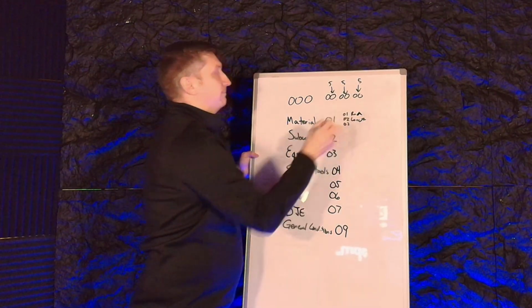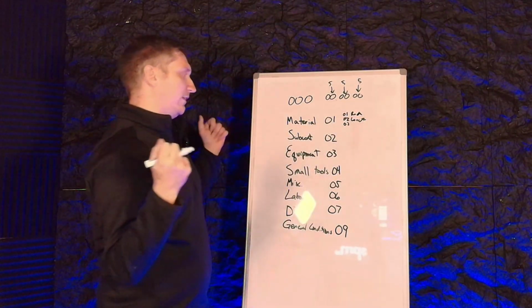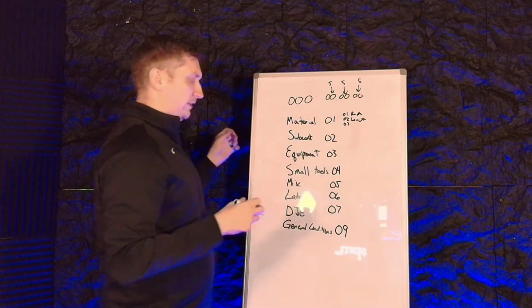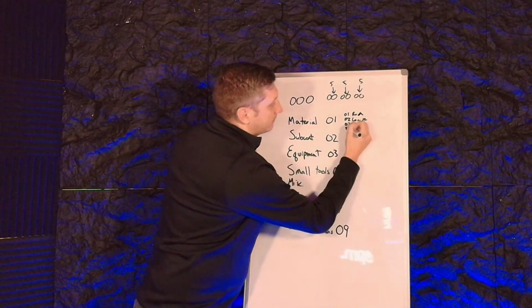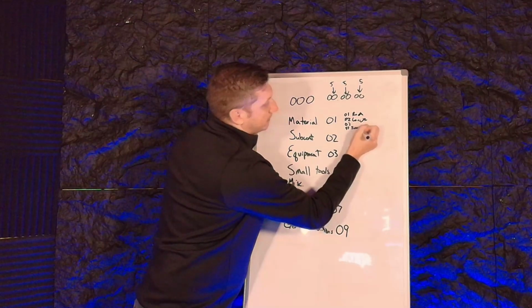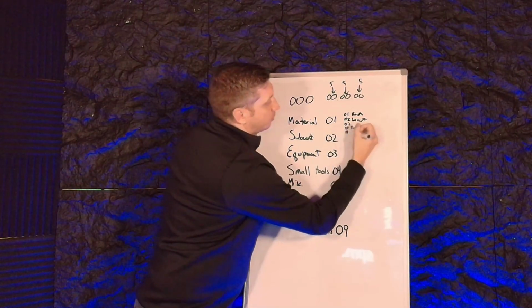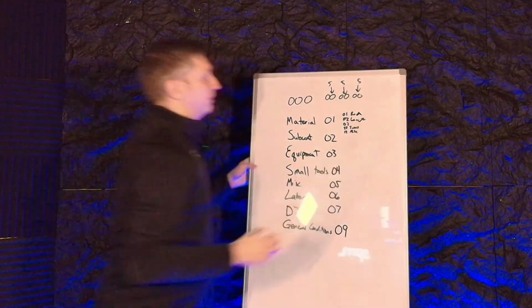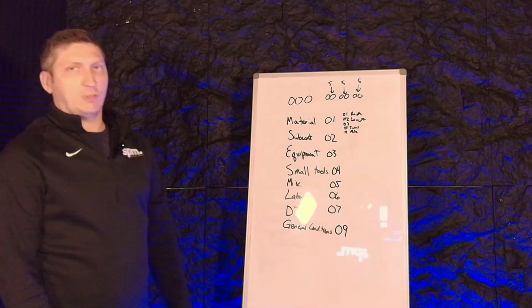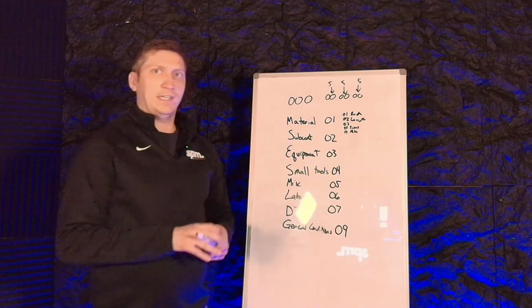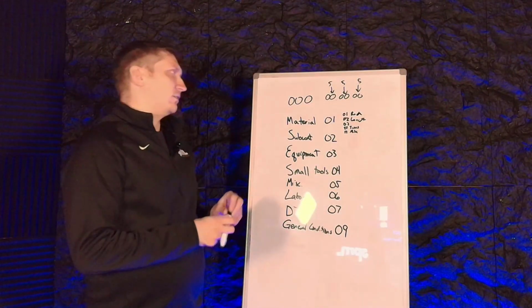03 is going to be, what's another thing? PVC or utility piping or whatever that is. And then I always put a 98 code for taxes and a 99 code for miscellaneous. And you're not going to have 100 codes as a civil contractor. I don't care how big you get, you're not going to have 100 codes. And it's also not worth tracking.